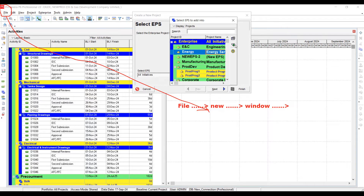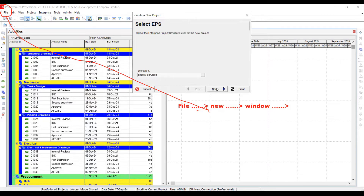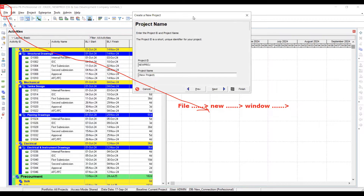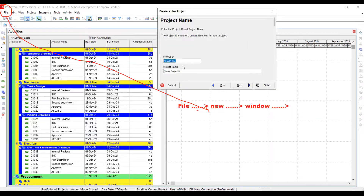There are different kinds of folders and I can put my project anywhere — like in 'Energy'. This is my project folder within Primavera P6. Next, my Project ID will be the abbreviation, and then my full project name.